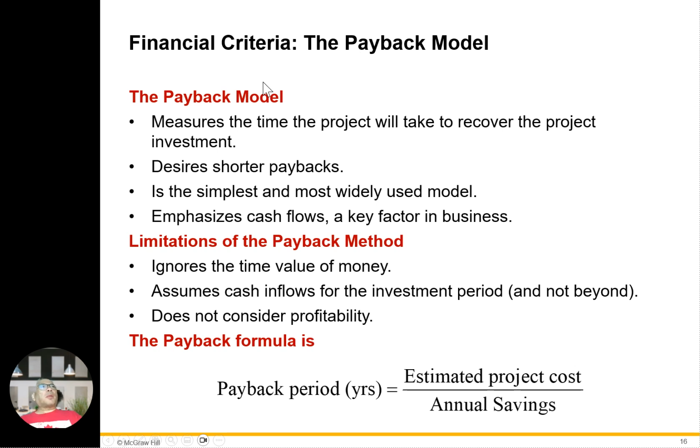The payback model. The payback model measures the time a project will take to recover the investment. It is in terms of financial criteria, guys. A shorter payback is desired. It is the simplest and most widely used model. It emphasizes cash flow, a key factor in business.